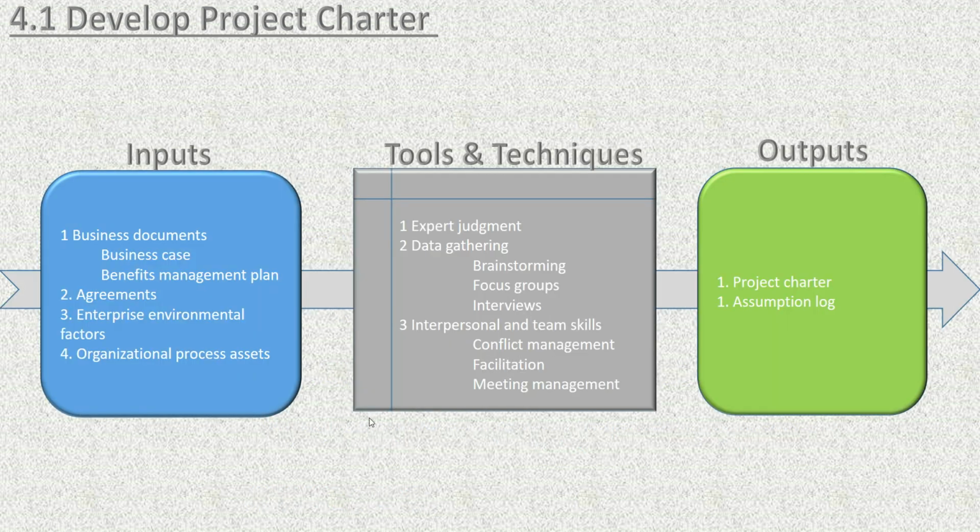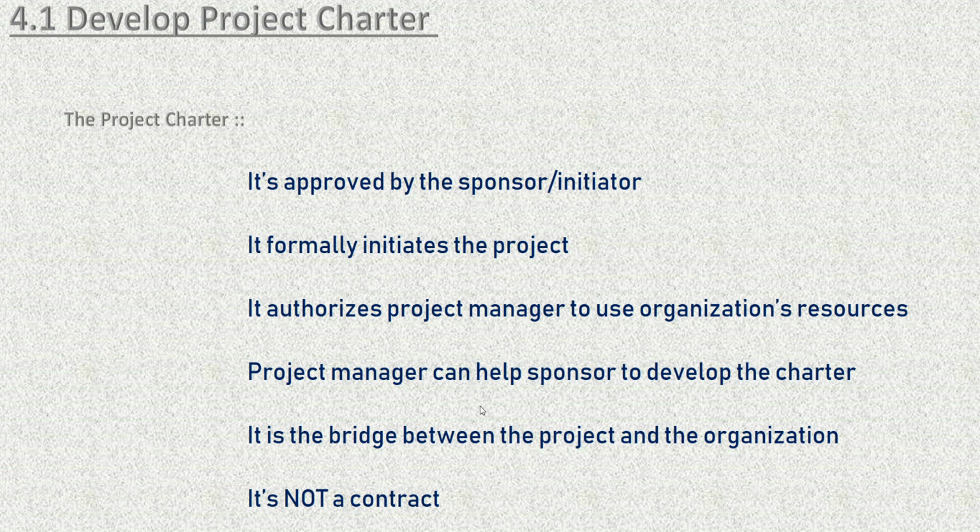Now, the responsibility of developing the charter and the responsibility of authorizing and approving the charter everything lies on the sponsor or initiator of the project. Having said that, while composing the project charter, the sponsor can take help of the project manager.